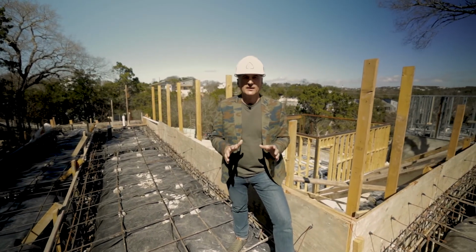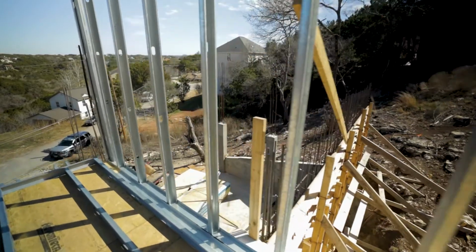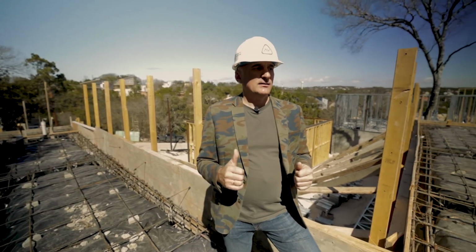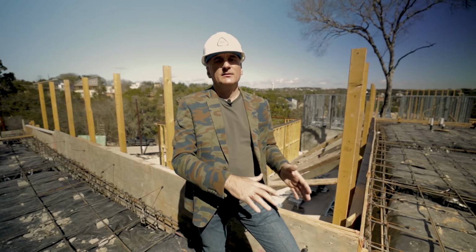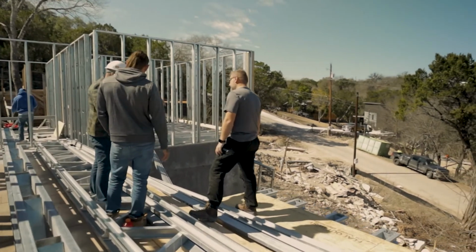Tomorrow, they are pouring the concrete on this site. To do that, we had to pass several inspections. We first ordered the survey with the guys who identified the house site location with the help of pins. After that, the inspector checked if the house was correctly located on the site. Next, we made the foundation form and sent the form survey to the bank. Then we made the rebar that the engineer who designed it had checked. The plumbing that we have mentioned above, we passed before rebar works. After that, we checked the pipes, and now we are waiting for the inspection, which will check before concrete pouring. Each of these stages is critical during foundation works. After pouring the concrete, we could not change its location or move the pipes, so it's vital to pass all inspections before concrete pouring.